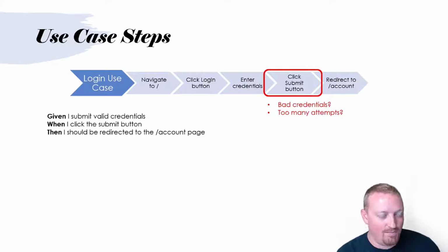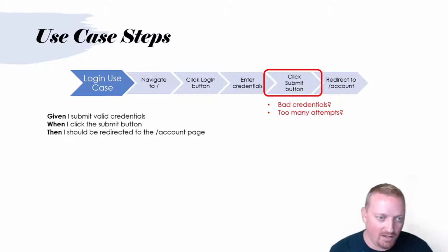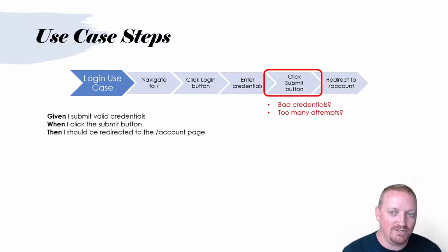Not only that, but when we're talking about the acceptance criteria here, I do want to point out that acceptance criteria is not user stories, right? So given, when, then is not a user story in and of itself. It could be translated to a user story, but it is not in and of itself the user story. That's one thing I just really want to make clear here, is that given, when, then is the acceptance criteria. It is not a user story. Now, the purpose of this acceptance criteria is much like the purpose of a test. And that's why I really like to make this comparison, or really, they are synonymous. They are the same thing.